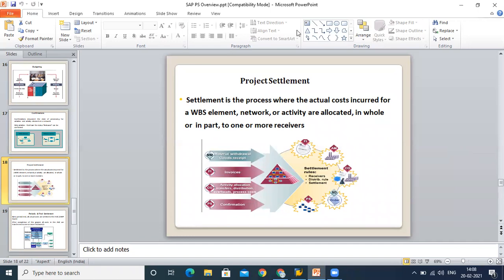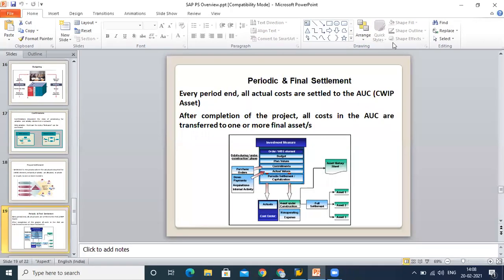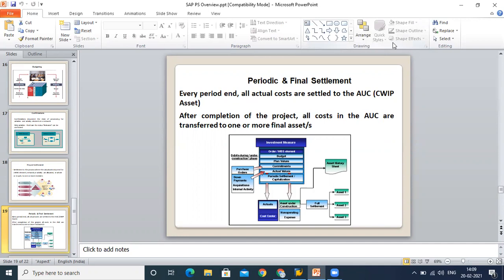It is simply accumulation of cost to know the final cost of your project. In this settlement, another thing is that sometimes your project duration is very large—say, a two-year duration. In that case, you are not going to wait for two years. You can go for periodic settlement. Periodic settlement means you are going to settle your project periodically based on month or quarter as per the need of your business. After you have periodic settlement in place, at the end of your project you can go for a final settlement.